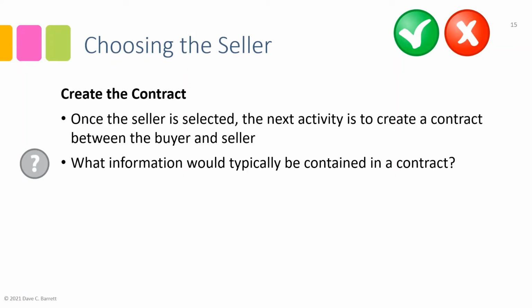There may be certain milestones that need to be met, the payment schedule of when that will take place, how changes will be processed, and a dispute mechanism if there are disagreements, how those will be resolved.